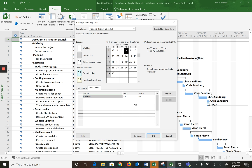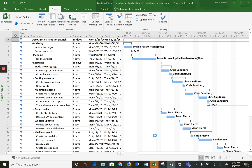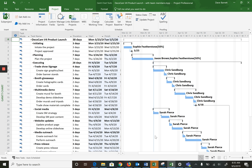We press OK, and press OK again. Watch what happens — as I press OK, you'll notice that the schedule shifts in. Because of all the automatic dependencies, we're now able to complete the project sooner. Because we're working six days a week, the durations of the activities can be done quicker. So that's one option you have.